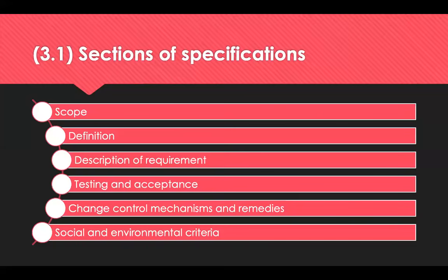In terms of testing and acceptance, it's used to determine whether a product meets its specification before it's released to the customer. So you're probably going to ask questions like, did we build the right thing? Is this what the customer really wants? It may involve physical tests like chemical tests or performance tests. If the product or service meets the standard, then it's passed as suitable. If not, it's rejected and corrective action will need to be taken.